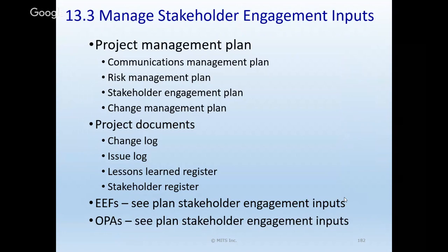Lessons learned register is the lessons we've learned on this current project. The lessons learned repository would be the storage of all the older lessons from other projects that we could pull in a lot of times to help us. But here, we're building on what we did already in this one through our planning, identifying stakeholders.